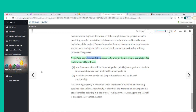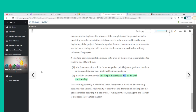Neglecting user documentation issues until after all the program is complete often leads to one of two things: the documentation will be thrown together quickly just to get it out the door on time and will more than likely be inadequate; or it will be done correctly and the product release will be delayed considerably.